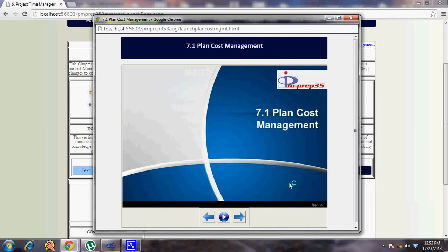So you control any variances. You ensure what your planned value is for the date. If I have completed 50% of the project, and I am supposed to have spent about, say, $500, but I am spending $600, then there is a control measure that is involved. So what you do is see how you can bring your cost under control in at least the remaining part of the project, or should you raise a change request stating that because of this reason the cost has gone overboard, so I need more resources, or I want some of the resources to be cut down, and things like that. So these become part of the control costs process, which is again a monitoring and controlling process.